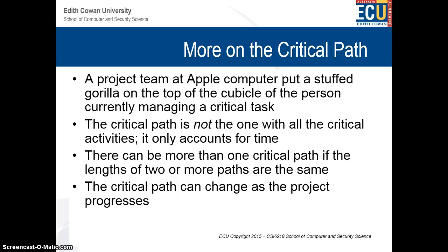What's a critical task? Probably a series of tasks, or it could be one of the tasks in the critical path. The critical path is not the one with all the critical activities. It only accounts for time. There can be more than one critical path if the lengths of two or more paths are the same. The critical path can change as the project progresses.